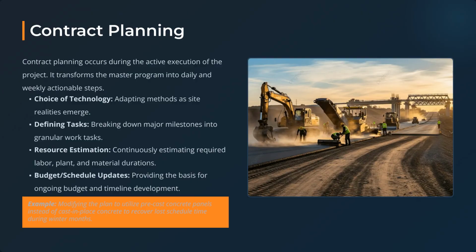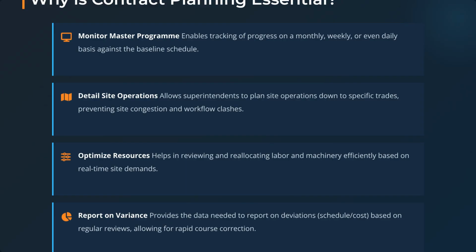Moving fully into pre-contract planning, this is where we finalize our pre-contract arrangements. This involves defining the organization structure of the project. Who is the project manager and who reports to whom? We also finalize site layout planning. Where will the cranes sit? Where are the site trailers going? This is also the time for placing orders for subcontracts and suppliers, finalizing requirement schedules, setting up budgetary control procedures, and conducting a thorough cash flow analysis. You need to know exactly when cash is leaving the business to pay suppliers and when it's coming in from the client.